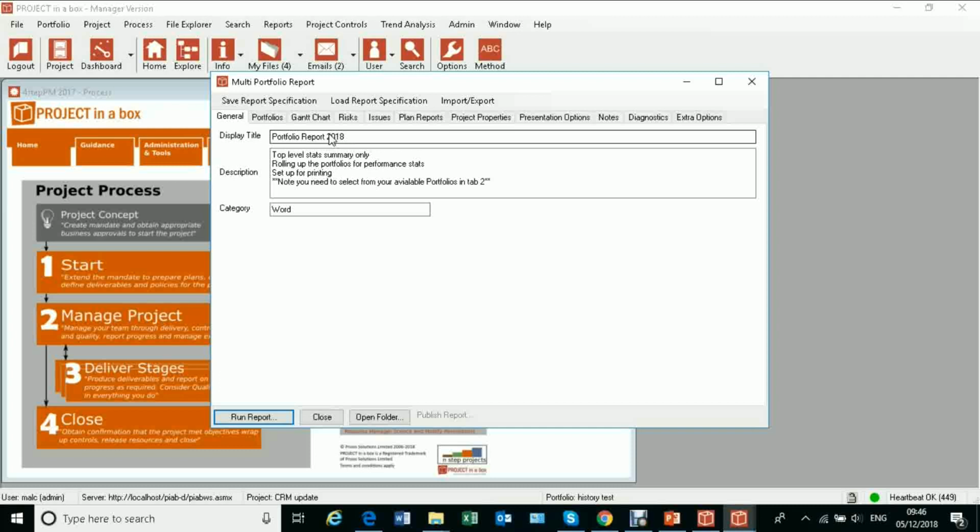for example, a department. So we've got all the projects in a particular department. All these different groupings that we need to report the aspects of the project to the rightful owners, the department manager or the program manager, for example. But sometimes we want to roll those up one level further. So we might roll up all the projects into their departments, and then all departments up to an operations director, perhaps. And we might roll all the projects for each customer into customer portfolios. And then we might roll all the different customer portfolios up to the sales director, for example, so that they can see how that grouping activity is working.